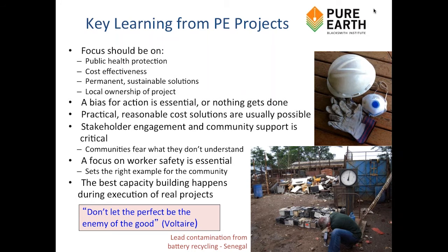Then the actual soil standard that you're most worried about is what are people being exposed to on the top? What's the soil level that you're covering it? So what I've generally done, for example, the Zamfara project, where the soil contamination was very extensive, but their standard was fairly low, we removed all the high contamination material. We actually set the number at 800 milligrams per kilogram to an offsite, to a nearby encapsulation facility, and then covered the other material, and then explained that to the government.